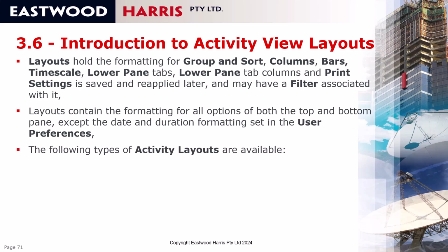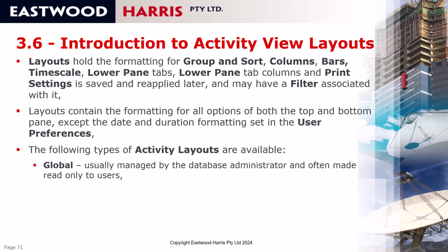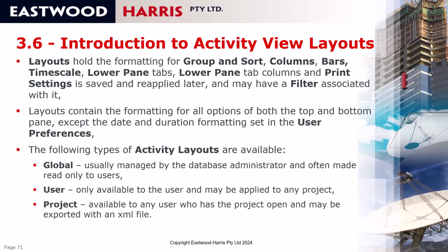The following types of activity layouts are available. There are global layouts that are usually managed by the database administrator and are often made read-only to users and usually templates for projects. There are user layouts, and these are only available to the user and may be applied to any project. And then there are project layouts that are available to any user who has the project open and may be exported with an XML file.